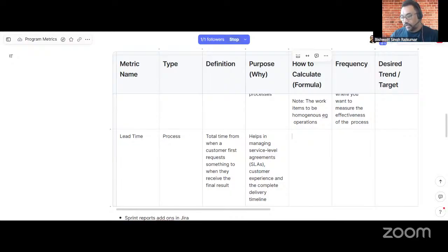We analyze whether this can be done within the time frame, because we have a quarterly release, and we check whether it can be done within the next release. If it is agreed, then we commit that requirement and say we will implement this. Otherwise, we consider the number of people available in the team, because the fourth quarter is normally a holiday season.